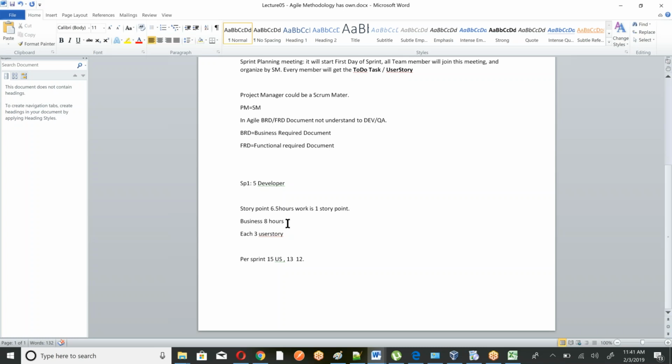So the thing is, suppose there are 15 user stories, or 14 or 13, whatever. I will explain. But after that, maybe all developers are not on the same page. Some user story is big. They could not complete it, but they completed 70% or 80%. So in that case, the work is not done completely. That time, what they do is put it as complete but create another one to continue. Oh, so we will continue.